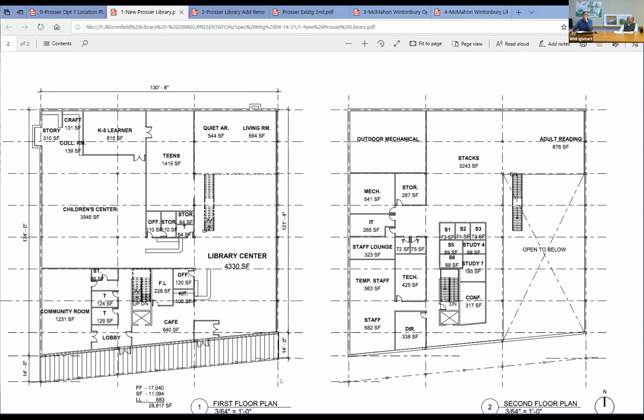But I have to remind you that 1,000 square feet is, let's say, 7%. But you're not going to reduce cost by 7% because you have everything here and just shrinking the envelope does not go in the same proportion. So maybe half of this, 3.5%. I mean, there are things like the stairs, the elevators, and the toilets that don't change as the building gets shrunken slightly. So that's why the cost.